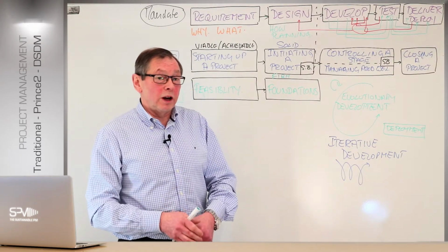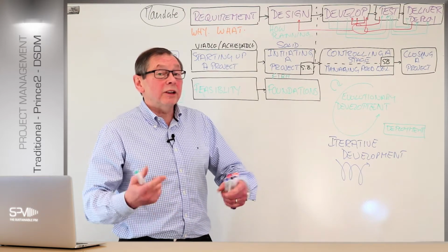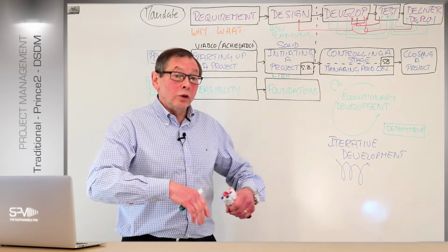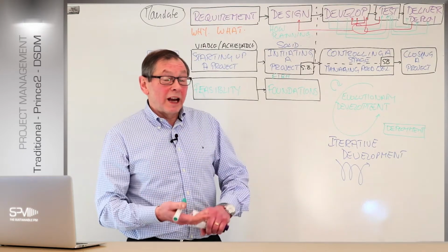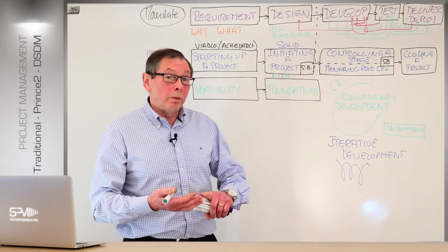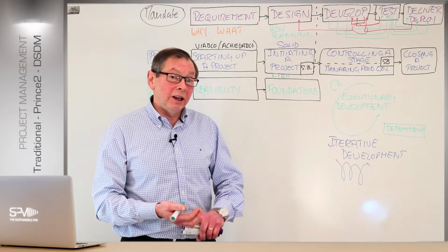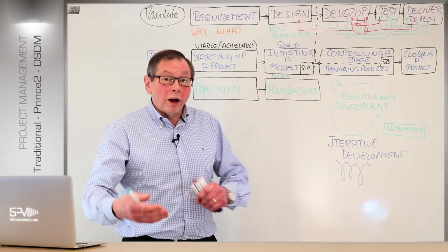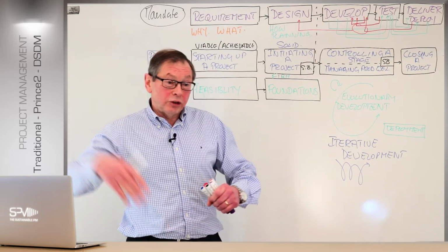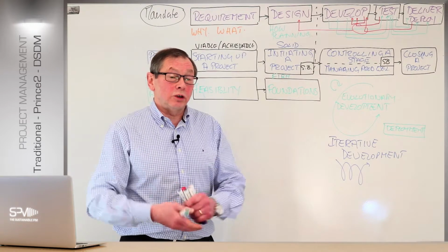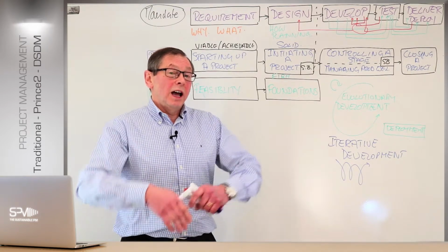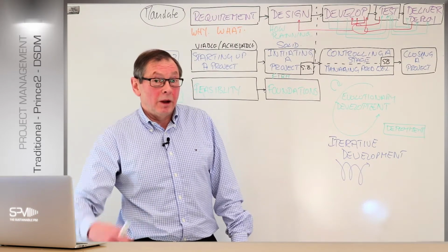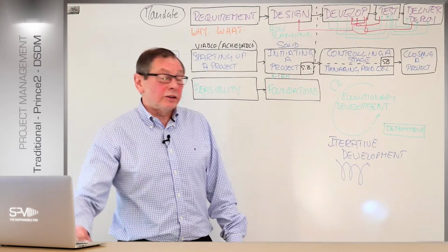One specific project was a new bank teller system for a bank in Australia, where what we needed to do was test the different levels of the applications, each gold, silver and bronze, independently on the network, and then bring them together and test them group-wise on a branch, and then internally and then externally on a group of branches locally so we could keep an eye on the network, and then we put them out nationally. So everything was piloted a step at a time on different parts and built on the understanding of the network.